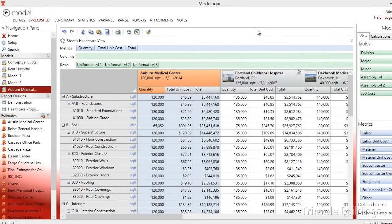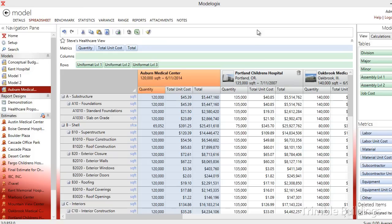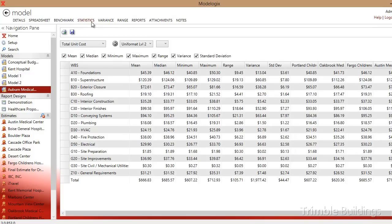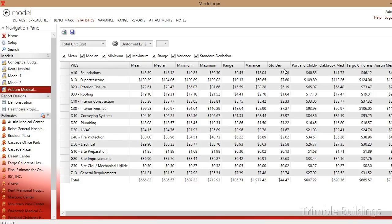Winest Modelogix makes it very easy to analyze the projects and look for outliers or costs within a given project that might be skewing the model. I can do that a number of ways. First, I can click on the statistics tab and I can see across my projects the mean unit price, the median, minimum, maximum range, variance, and I can even see standard deviation. And I can notice that some of these projects, the price difference is quite different than what is in the overall model.